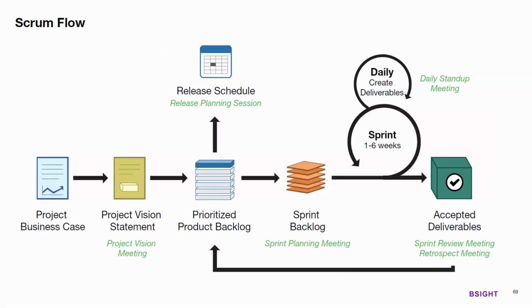That's about the team. Now let's go back to talk about the sprint. We discussed 1 to 6 weeks, usually 2 weeks, that is time boxed. Today is day 1 of the sprint. It will be 5 days a week, so 2 weeks is 10 working days. On day 1, what time you conduct the sprint planning meeting is up to the team, product owner, and Scrum Master. This is also time boxed. Let's say it will be happening from 8 to 10, 2 hours max.